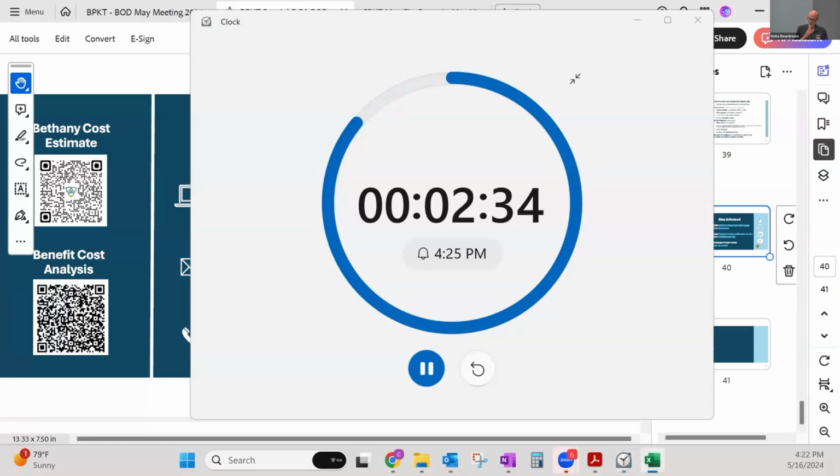The 26.8% is the level of inflation that has occurred from 2020 to 2023. We did our updated estimate in 2023 dollars. And so when we compared it back to the old 2020 cost assessment, we used that 26.8 to escalate that number to give us some reasonable comparison. Contingency was assigned to the updated estimate at 30% for construction costs, 15% for soft cost labor. And then we had a couple hard numbers plugged into the estimate with 0, but most had 15 or 30%.